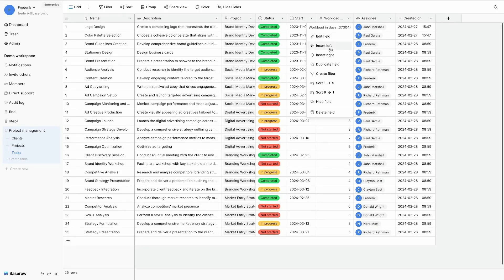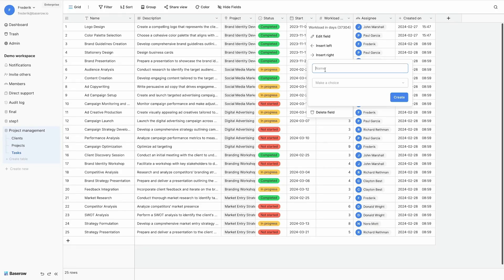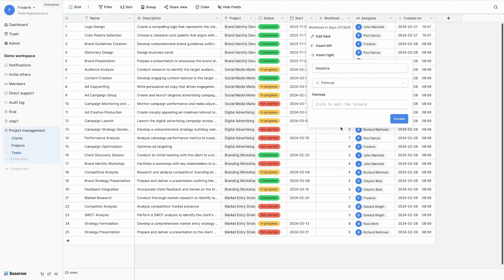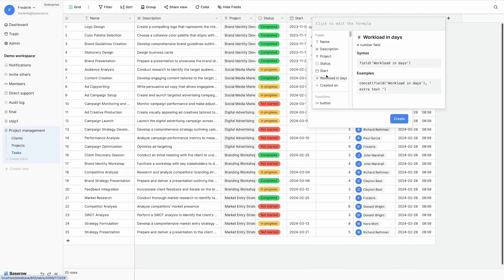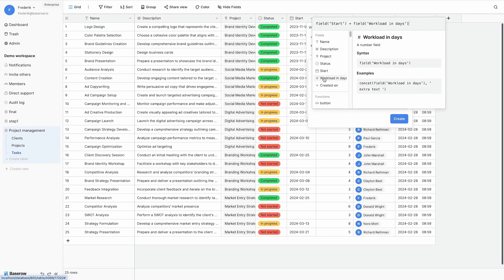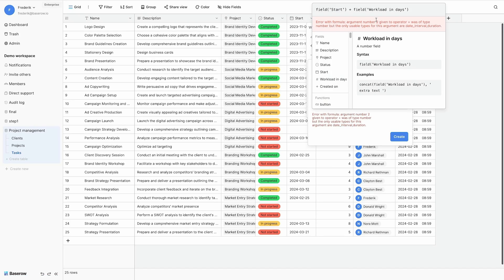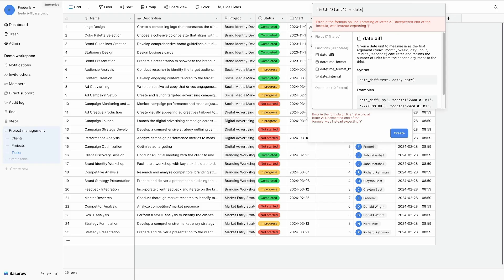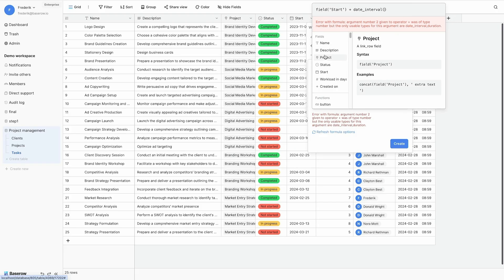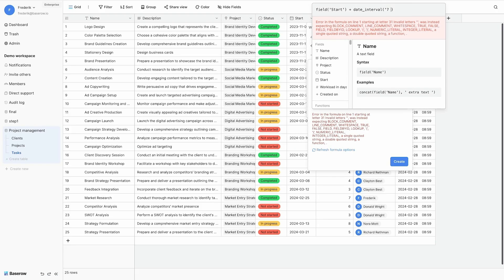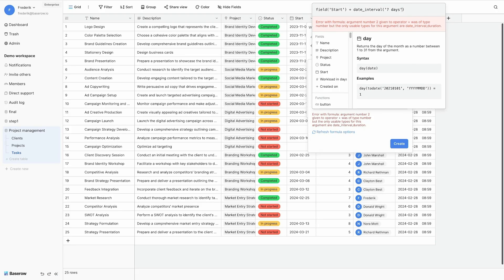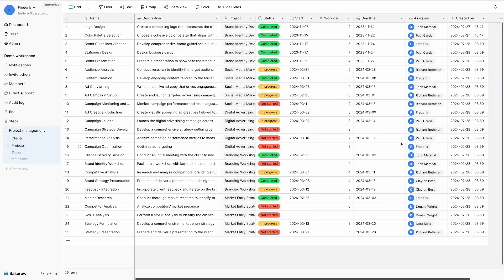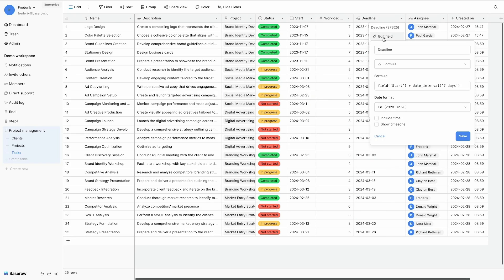My first formula will be used to calculate the deadline of a certain task. And I will do this by taking my start date and add the workload in days to it. However, this returns an error message because I cannot add a number to a date. I need to use the function dateInterval for this. And dateInterval takes as an argument a number of days. So for example seven and it adds seven days to each task. Now that's not the intention.